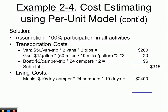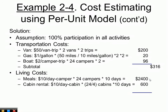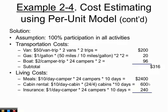Living costs include meals at $10 per camper day × 24 campers × 10 days = $2,400. Cabin rental at $10 per day per cabin, with each cabin holding 4 campers — 24 ÷ 4 = 6 cabins × 10 days × $10 = $600. Insurance at $1 per day per camper × 24 × 10 = $240. Total living costs add up to $3,240.